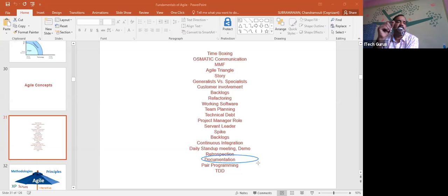A lot of people say, I'm creating a product, and for the product I'm creating documentation. Do you need to do the documentation every sprint? The answer is no. These kinds of documentation can be done at the end of the project, when you have a full-fledged product. At the end, not every sprint, because every sprint the product keeps on changing, then documentation also keeps on changing. So you are redoing your work and wasting a lot of your time. I hope you are able to understand this. But at the end of the last sprint, when the product is stable, that is the final sprint, there you do the documentation. Nobody stops you.